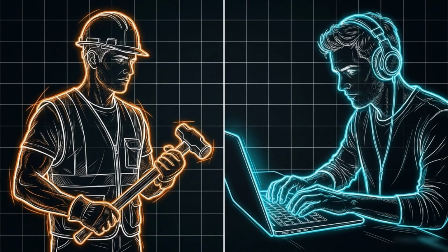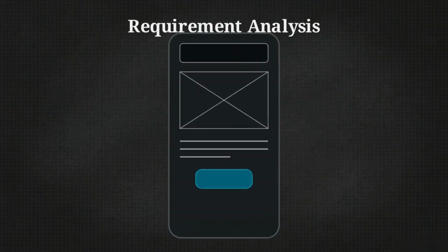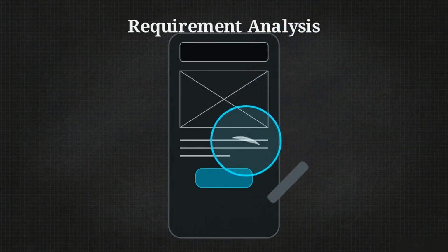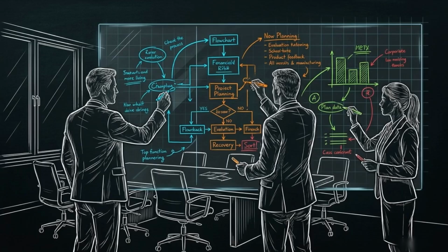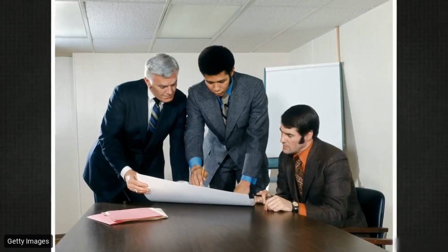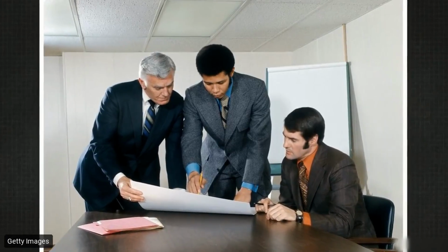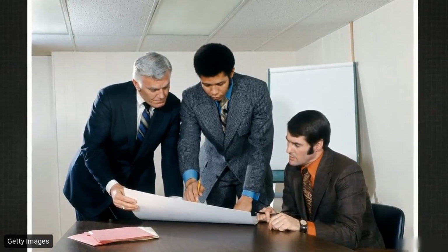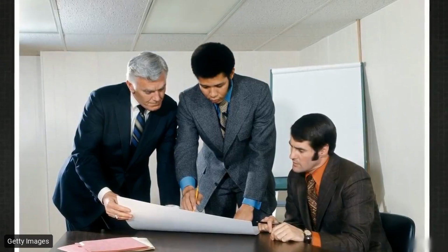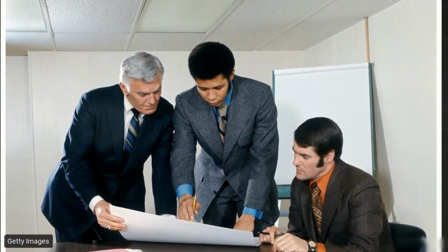Software development suffers from this exact same staffing trap. In the earliest stages of making an application, when you are analyzing requirements and figuring out what the software needs to do, you only need a few planners. By the 1970s, managers realized keeping a giant team on the payroll from day one was draining their budgets before the actual coding even began.